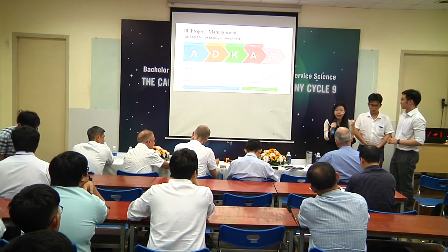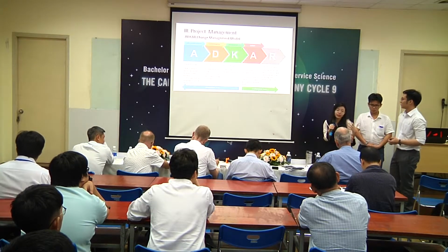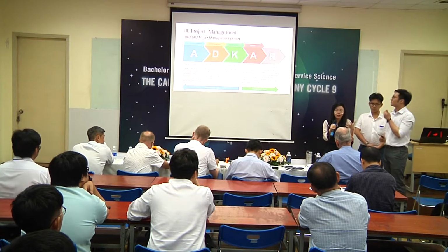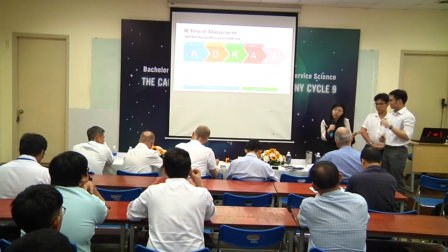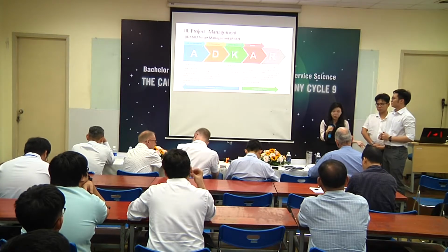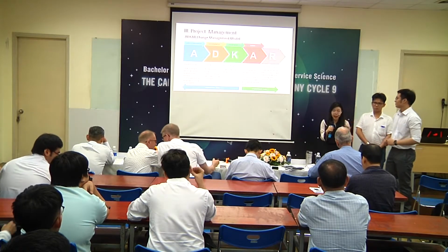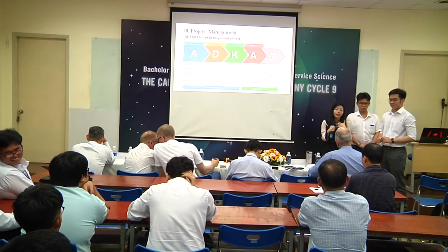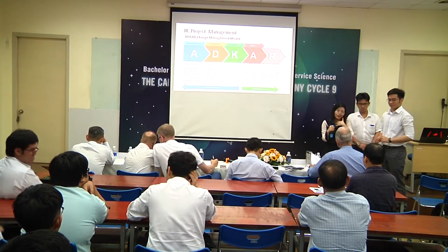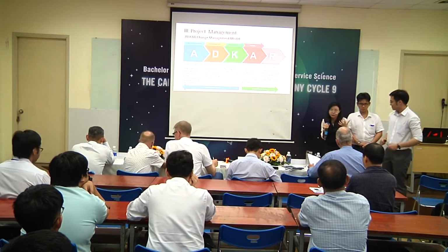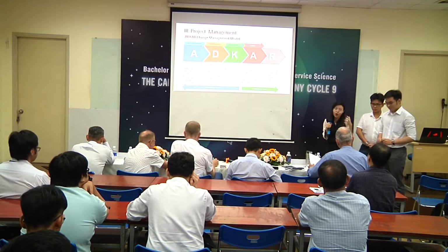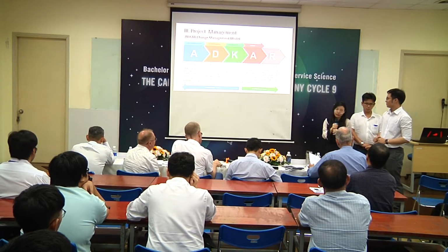First, we thought that it was easy to learn a new design tool, for example learning Photoshop or a prototype tool, but it takes more time than that. That's our estimated time. That's my mistake, so that's also a useful lesson for the future.